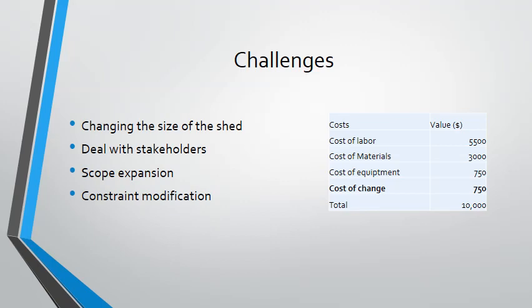Instead of 30 days of period of completion, I had 32 days. Having this budget, $750 for change, made an extra risk on the project because we were barely on budget. So whatever extra thing had affected the cost, we would have been over budget. However, nothing extra happened.